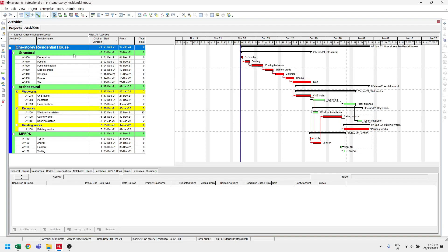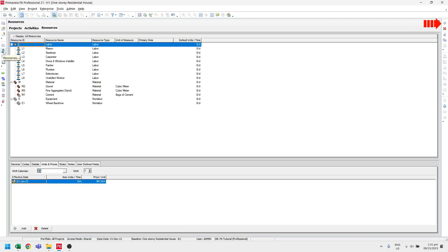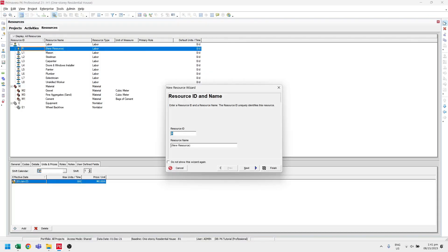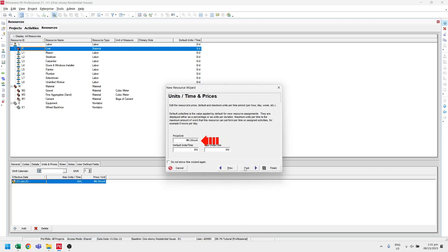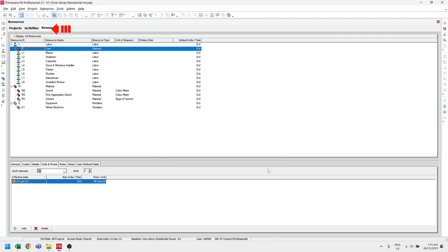Now we have to create a resource. Let's click this icon and click add. We can name this resource as 'cost'. On the next page, select materials. On the next page, set the price per unit to 1. After that, click finish. Now let's go back to activities.